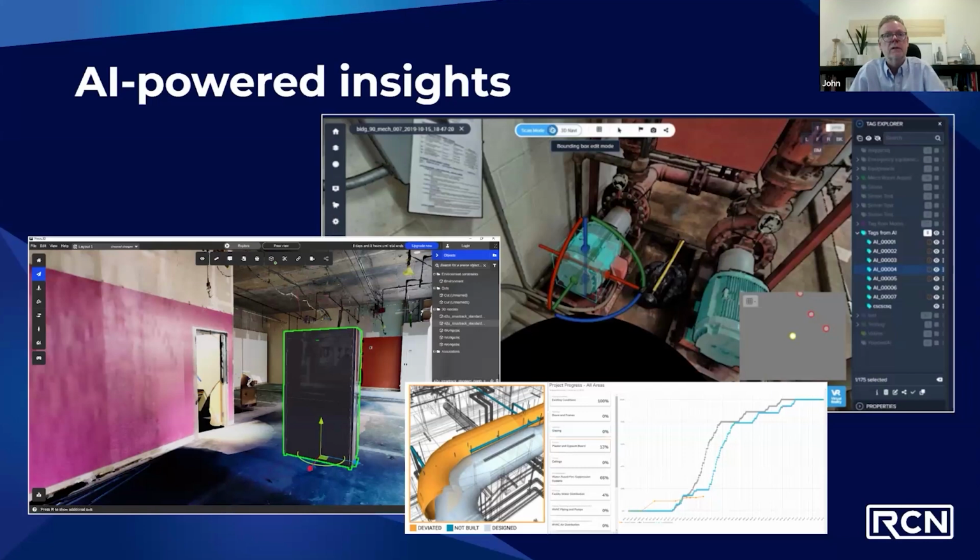So, for instance, when I started out in this, you would spend a day out in the field collecting and spend another 2 days post-processing. By the time I got the data ready and served back out, they'd already poured the floor, for instance. All right, that's not useful. That's just a waste. But now we have the ability to go out with very similar scanners that are enhanced, that are connected to the cloud. They're automatically uploading their data and making sense of it, and can have it turned back around in a matter of hours instead of days.